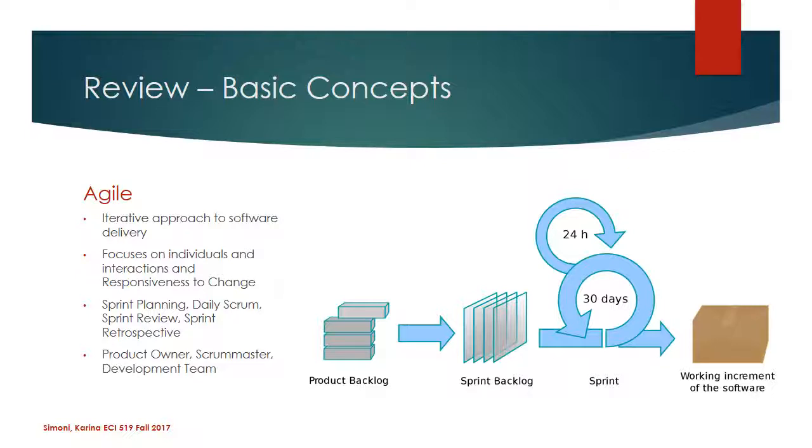In our sprints, we're going to do the actual work. We're going to build the features. We're going to teach the lessons. And we're going to pull in the crops or plant them. Each day, we're going to spend a few minutes, 10 to 15, talking about what we did yesterday, what are we going to do today, and how can we improve? Does anyone need help? At the very end of our sprint, we're going to have a working increment of our software. We're going to have covered a lesson. We're going to have brought in crops and they're ready for market.